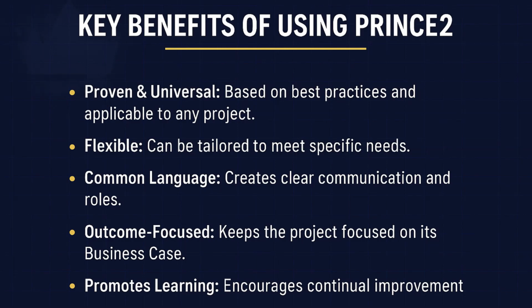Which principles are key? Here, the principle of managed by stages will be rigorously enforced. Because it spans financial years, the stages are probably aligned with budget cycles, forcing the board, using DP, to apply that continued business justification principle very formally at each major funding gate. Do we commit the next X million pound? And the stages themselves would be sequential. Totally sequential based on the work. The plan shows clear, distinct stages like design, then site preparation and construction, then testing and inspections, then finally demobilization. You can't overlap those meaningfully in this context.